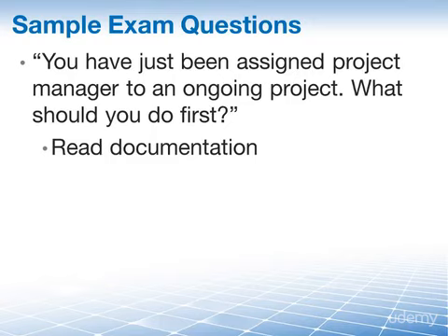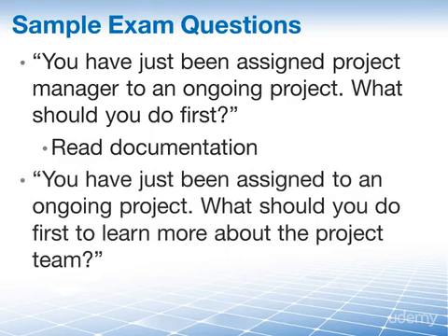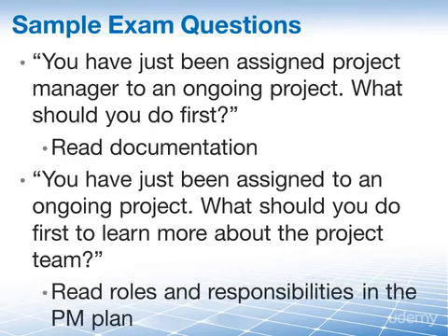A similar question had the same premise, namely that here you have just been assigned to an ongoing project. What should you do first to learn more about the project team? And the answer here is that you should read the team member roles and responsibilities in the project management plan.